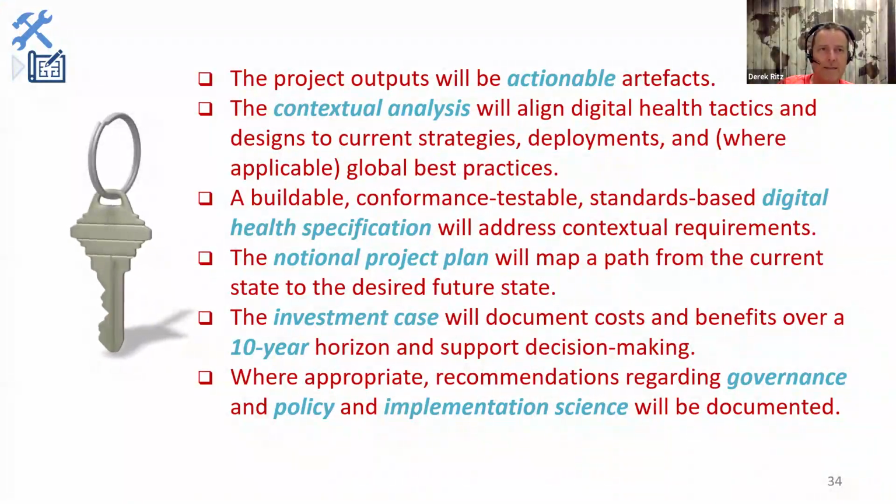When I was there in 2016, I said, here's an implementable blueprint. You can't implement it yet. You have to change your legal basis for a national health information sharing infrastructure. And until you do that, you're not going to be able to get traffic on this HIE. And it took years. It took 3 or 4 years for them to make the change in the legislature. And when they did, they could actually start to move forward.